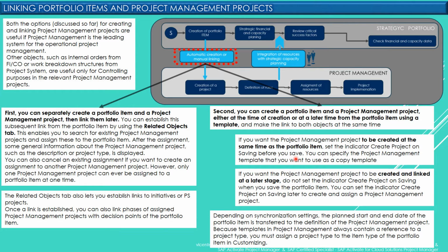Or if you want to create the project management project at a later stage, then you must not set that indicator, and you can set the indicator Create Project on Saving later to create and assign a project management project.